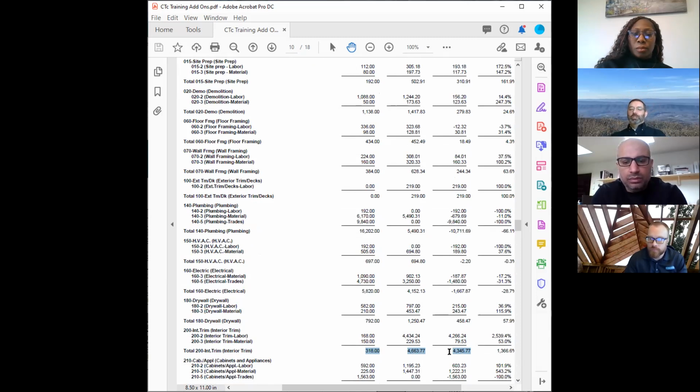So when you're looking through your job cost and you're early in a project and you see, man, my labor is starting to leak up, there's an indication that something might not be going the way it was planned, right? So this is one of the critical over and under budget categories for us to keep an eye on. And then we'll talk a little more about how we see it going forward.